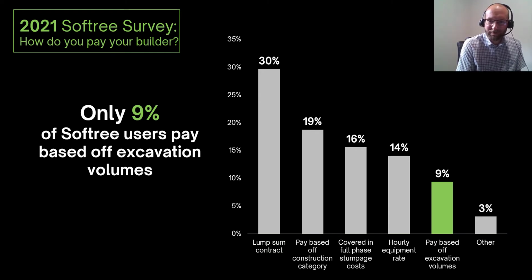In the past, it's been difficult to get as-built data, but there have been advances in topo data collection that make this a smaller challenge now. Now, hourly is similar to paying for volumes, but the main drawback with this is if you have an unmotivated or incompetent crew, that problem can become a project owner problem instead of a contractor problem.